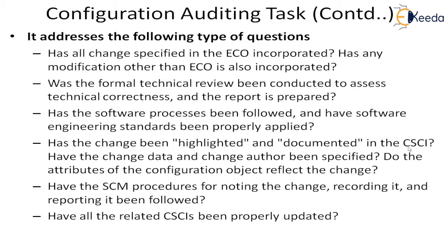Whenever you have a configurable item and you are making a change, then you have to mention in the document, somewhere highlighted, that this document is undergoing the change, who is the author, when it was changed, and why it was changed. So do the attributes of the configuration object reflect these changes? Have the SCM procedures for noting the change, recording it, and reporting been followed? So whether the software configuration procedures for all these kinds of items have been followed?